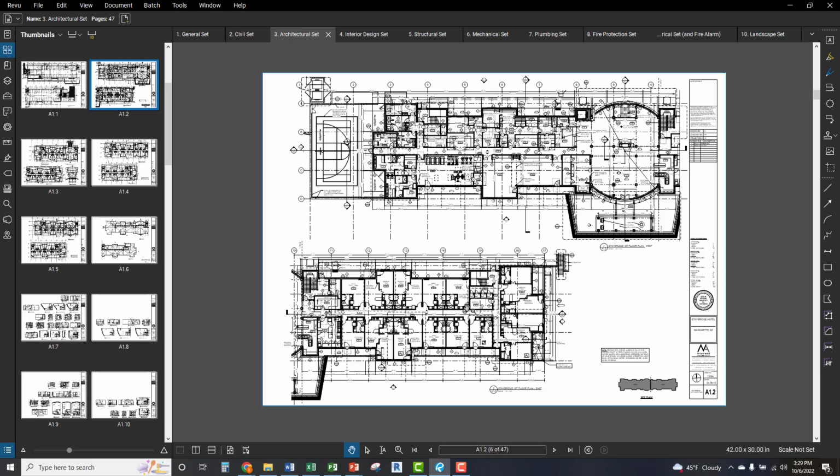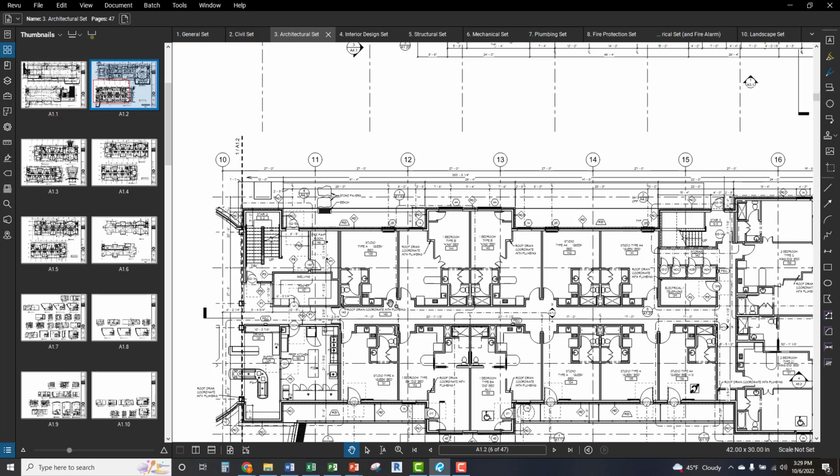Utilize your summary tasks, figure out what makes the most sense sequentially, as far as where am I going to start this project, where do I want to finish this project, and then look at big picture items first, and then start breaking it down into smaller items as you go. Because if you can start doing that, it takes all of this stuff and breaks it down to, well, I'm really just looking at this room, say, 50 times, right?